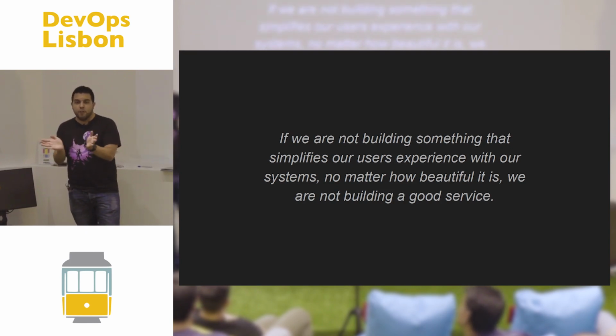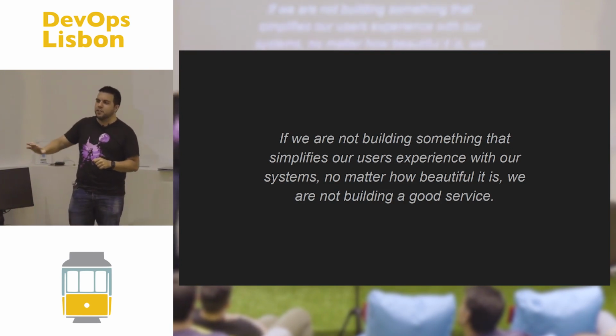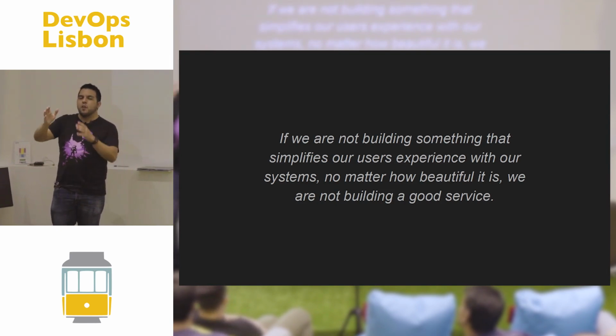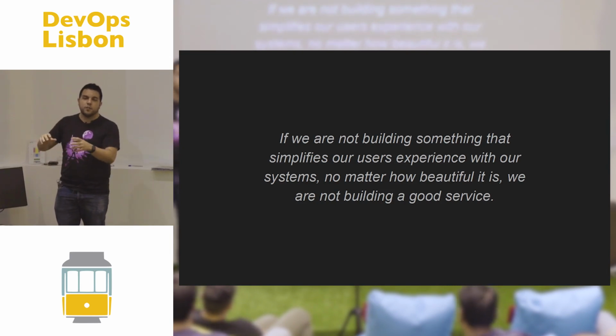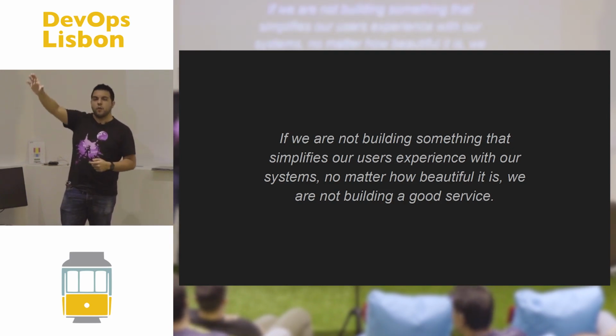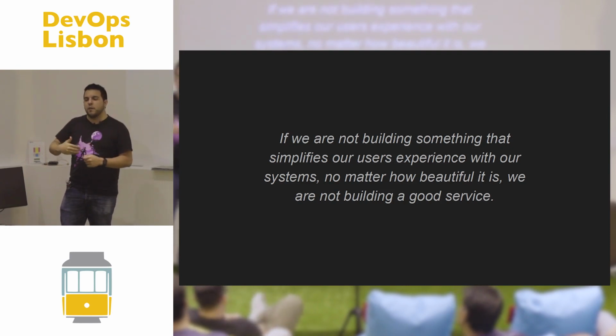We have two parts of our work, which is the dev and the ops. The dev is the cool part. We have a roadmap, and we say, okay, we have all these features being requested, so we're going to do this. We promise this for this quarter, and we publish that. We say quarter 2, this is going to be open, and we publish it on a public billboard for developers, saying these are the quarter 2 objectives. Then we manage it internally in terms of sprints, and we release them as we work.